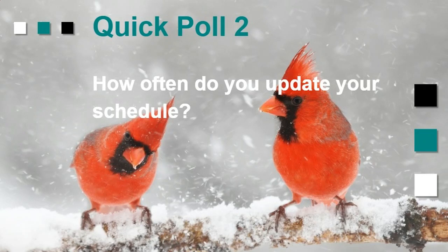If you're doing turnaround projects, you've got to get those updated every single day usually. And those could be a few hours, which in a turnaround is quite a bit of effort. And of course, you might be taking a day, 2 days, depending on your project, especially those mid-range upgrade type projects or smaller capital projects. So it really depends on the kind of project.